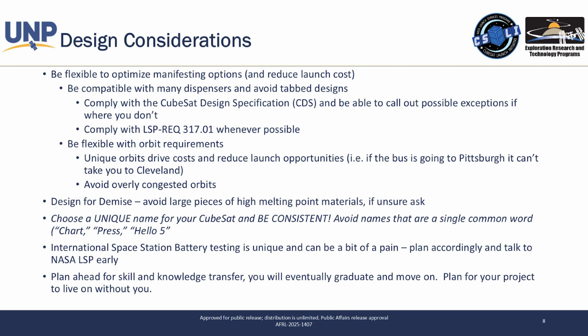And then also, a pet peeve: please, please, please avoid tab designs. I can only speak for myself. Tabs are a pain in the rear end to deal with. A lot of times, the dispensers that are actually compatible with tabs are very limited. And so it makes it very difficult for the launch vehicle provider at times to procure a dispenser for you. Not only that, a lot of times tab dispensers actually drive up the cost of your launch service.